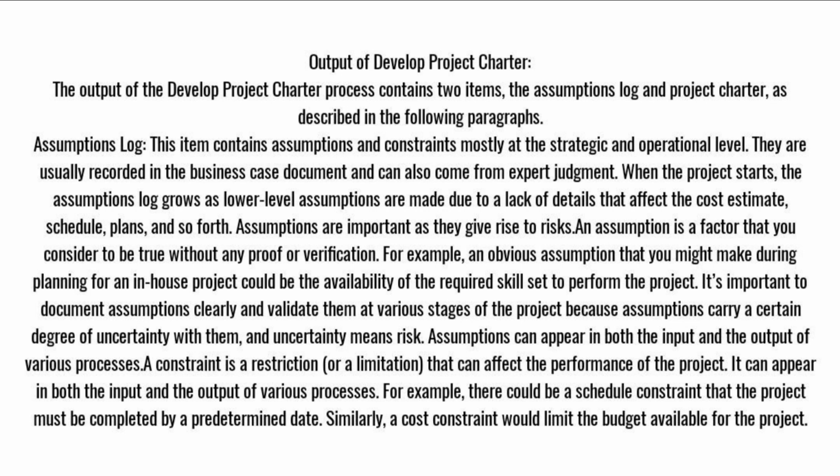It's important to document assumptions clearly and validate them at various stages of the project because assumptions carry a certain degree of uncertainty with them, and uncertainty means risk. Assumptions can appear in both the input and the output of various processes.